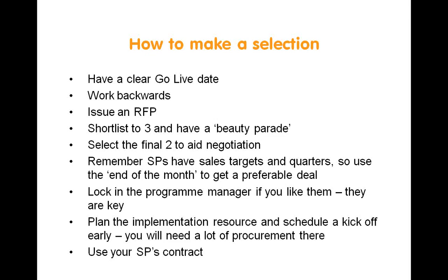And then you just need to make sure that you are asking the market and issuing RFPs probably around June time, maybe even earlier, May or June, which means you need to start doing everything that we've been talking about here pretty much now. So it's not something that you can just push through really, really quickly. It does need a lot of time.